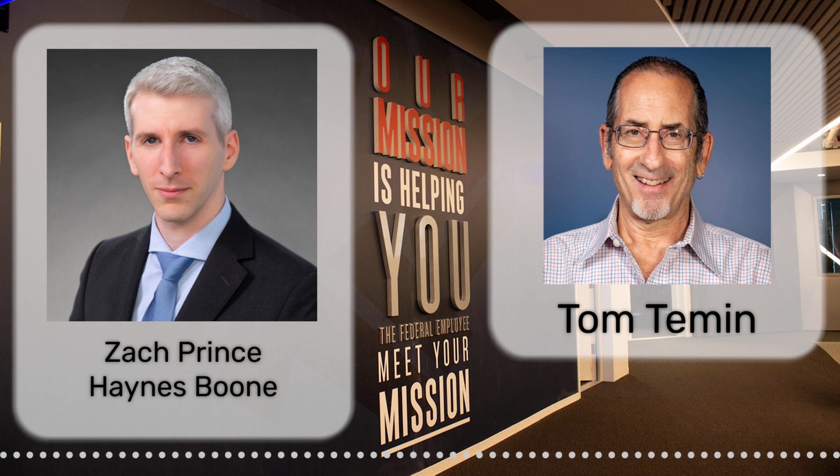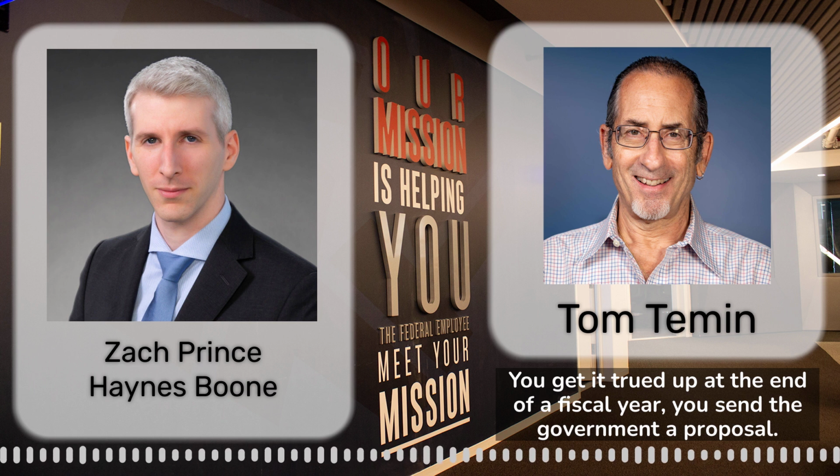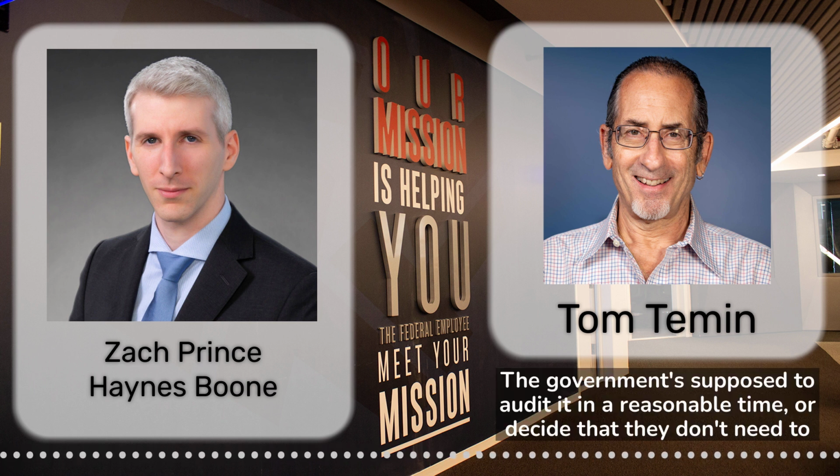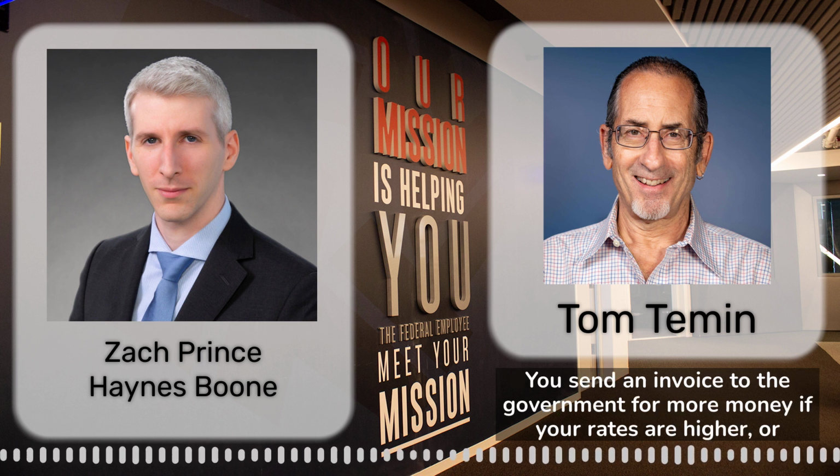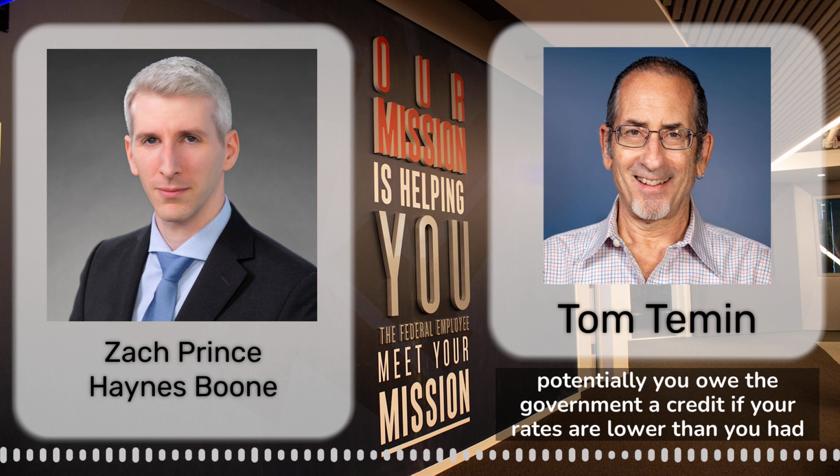It's provisional. You get it trued up at the end of a fiscal year. You send the government a proposal. The government's supposed to audit it in a reasonable time or decide that they don't need to audit it, come up with a final rate, and then you have a true-up audit invoice. You send an invoice to the government for more money if your rates are higher, or potentially you owe the government a credit if your rates are lower than you had assumed.